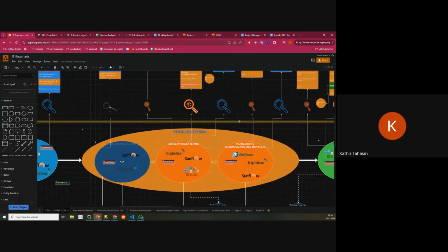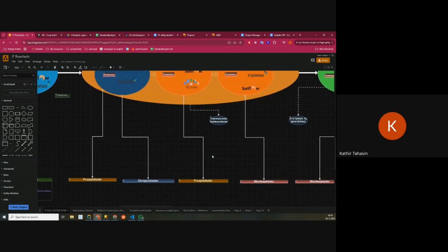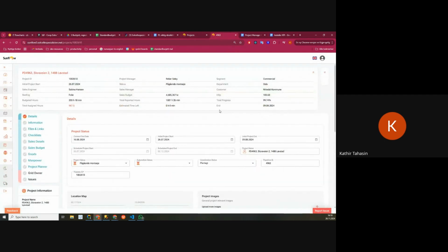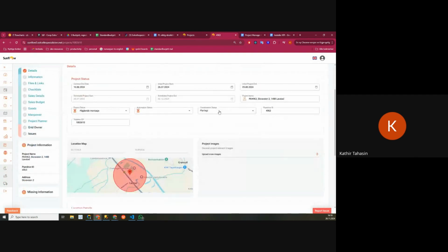Right, and then it transitions on to when a project manager does their detailed project engineering steps. In this step, the project manager needs to calculate the plan of the project, the staffing plan, the engineering plans. He must fill out important documentation, safety documentation, compliance documentation, and whatnot.